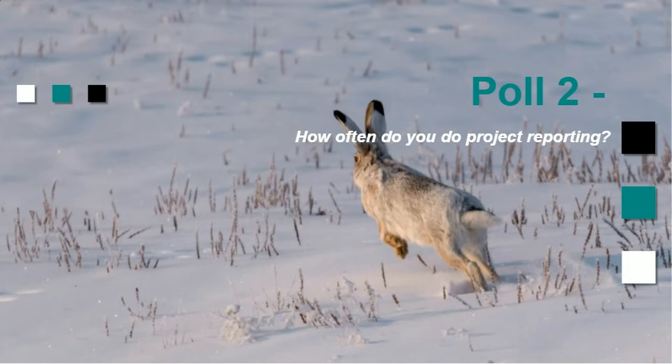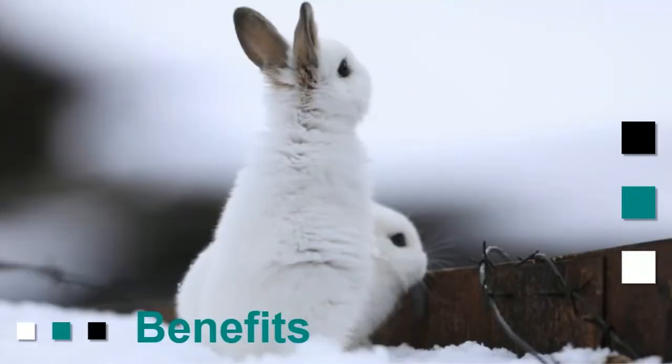So some of the benefits of P6-Reporter will be that you control the data flow. Okay, so the snapshots can be done automatically. So some of our clients run automatic scheduling using P6 calculator, and then automatic snapshotting with P6-Reporter, which allows for a consistent approach to pushing the data out to the third-party reporting tools. So it could be daily. If you're in a turnaround, we could definitely do it daily.